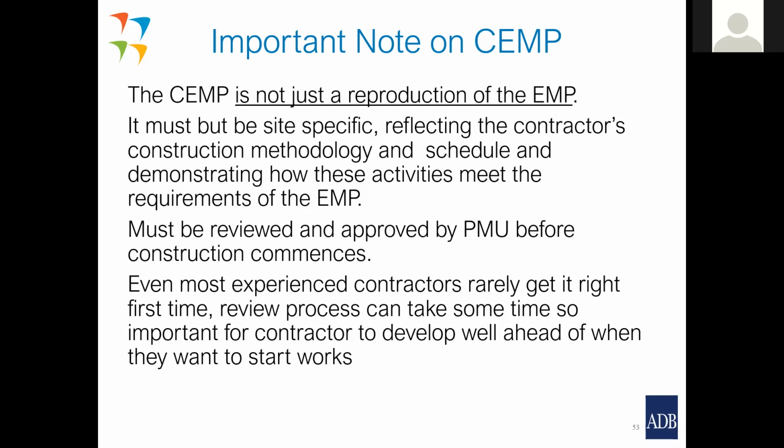So you need to have these requirements, you need to put it in the contract document that he needs to have the resources available to prepare a CEMP that will meet the approval of the implementing agency. And he must develop it well ahead of when work starts.